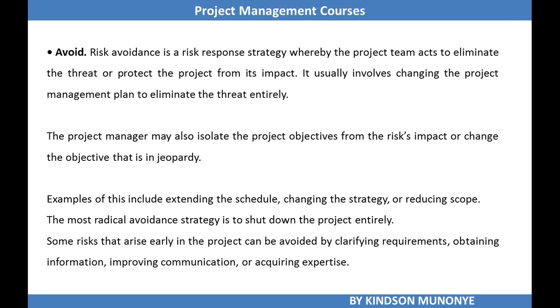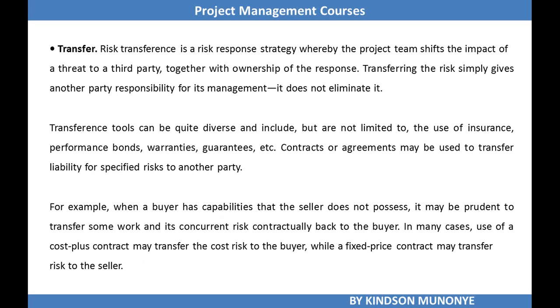And one of the risks you envisage is that persons from the community where the road will pass through might frown. They might actually go on demonstration. They might stop your project. So what will you do? You want to avoid it. So you might decide to carefully avoid allowing the road to pass through the trouble zones, something like that.